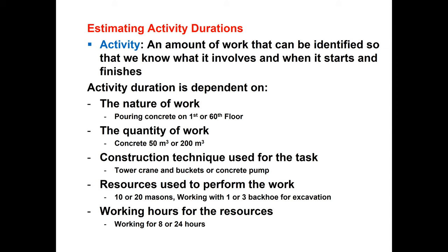Duration is also dependent on the working hours for the resources. Meaning, are we going to work in just one shift, 8 hours per day, or in two shifts, or around the clock, 24 hours? If we are working 24 hours on that work, the duration of the project will reduce.